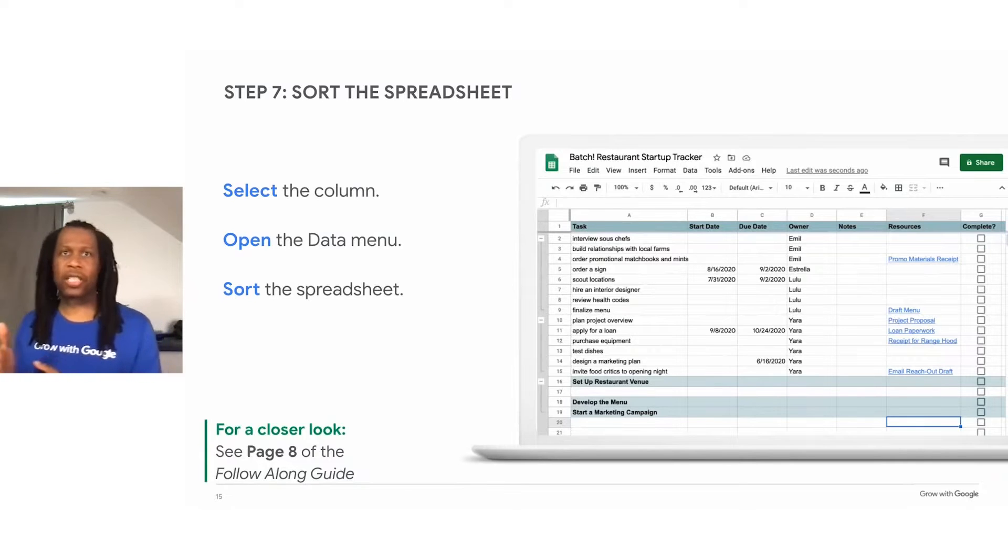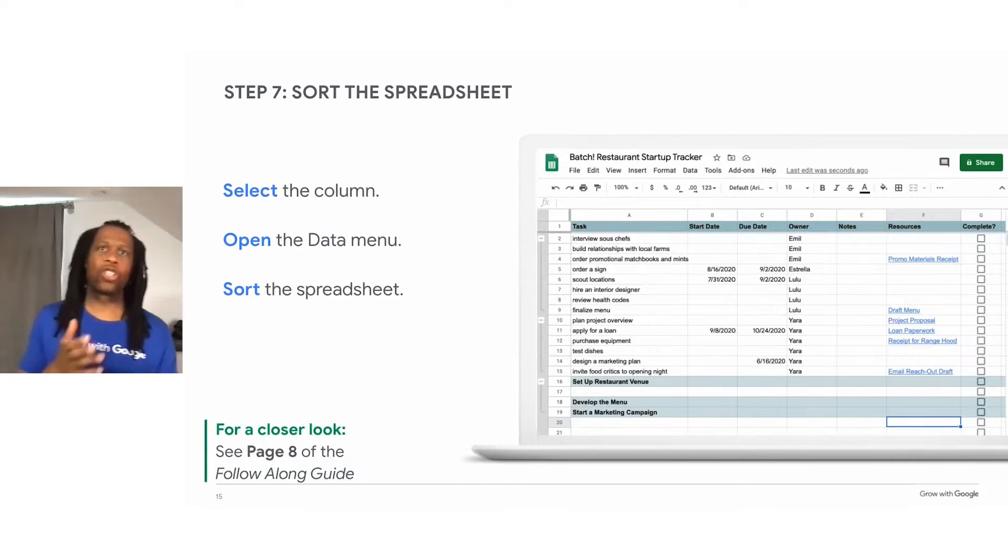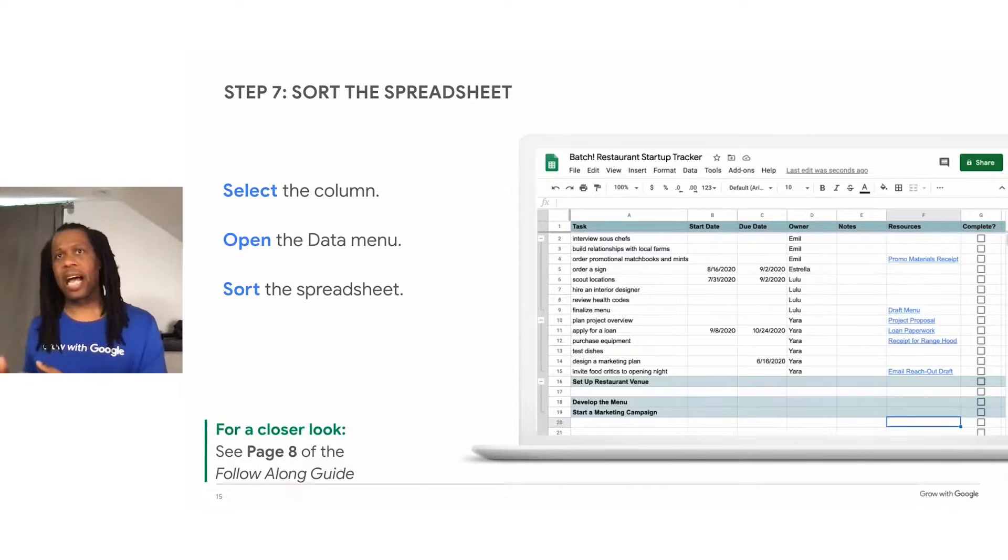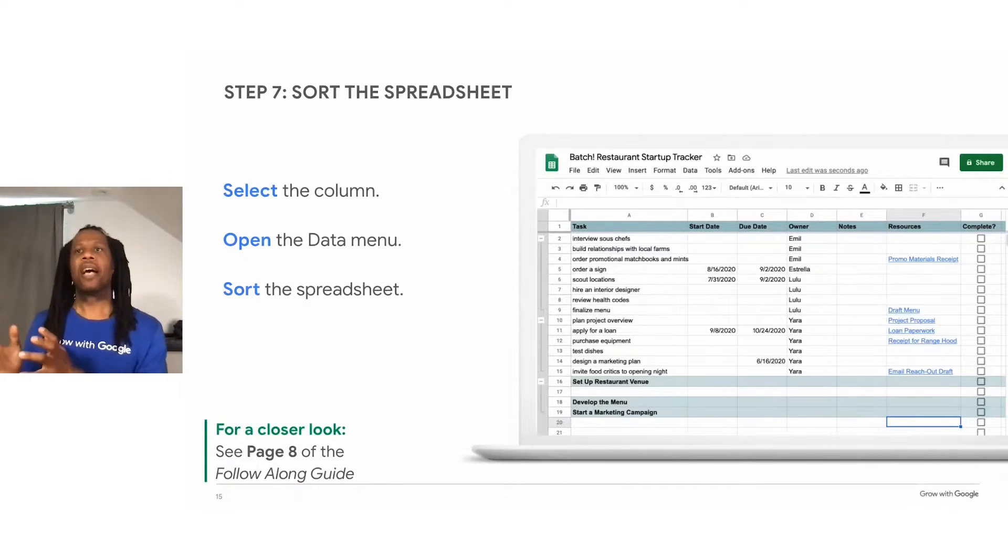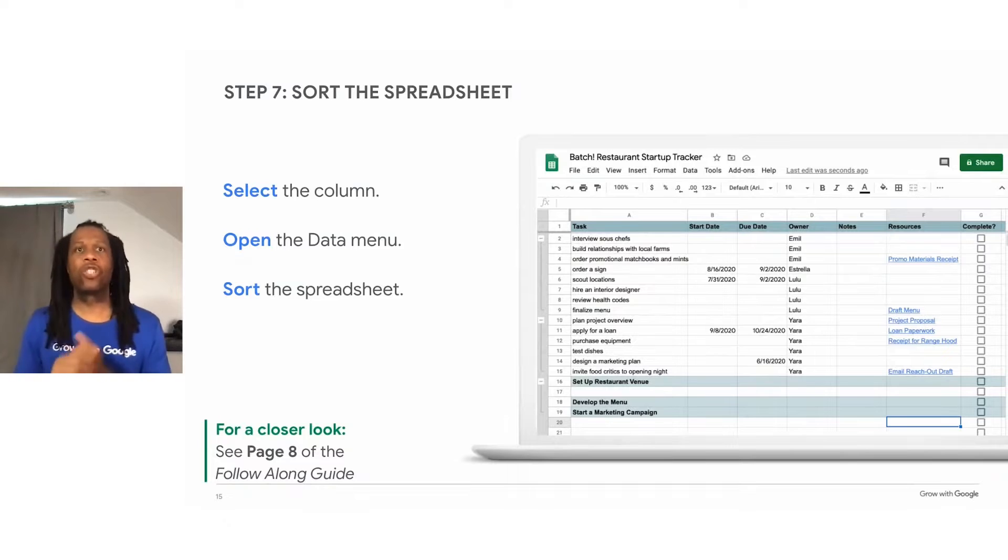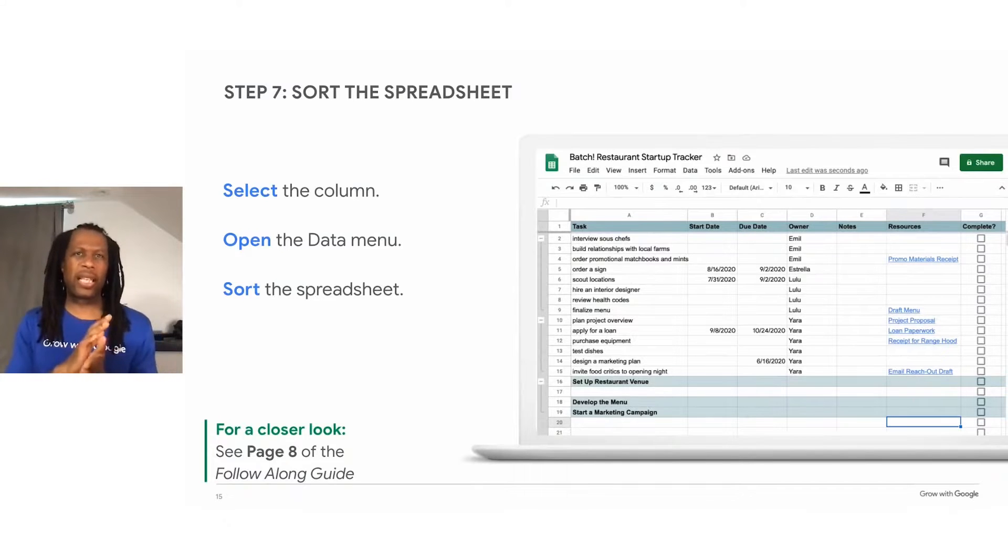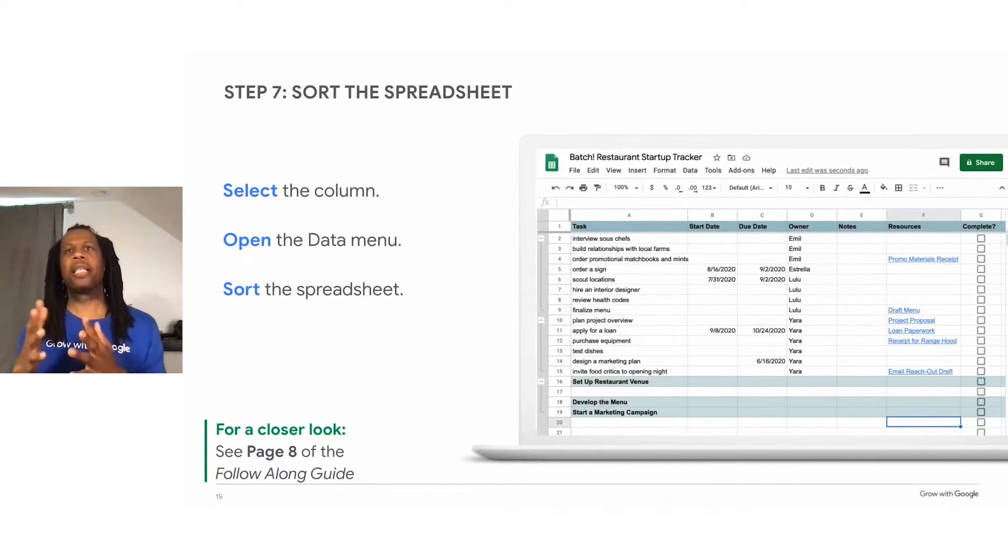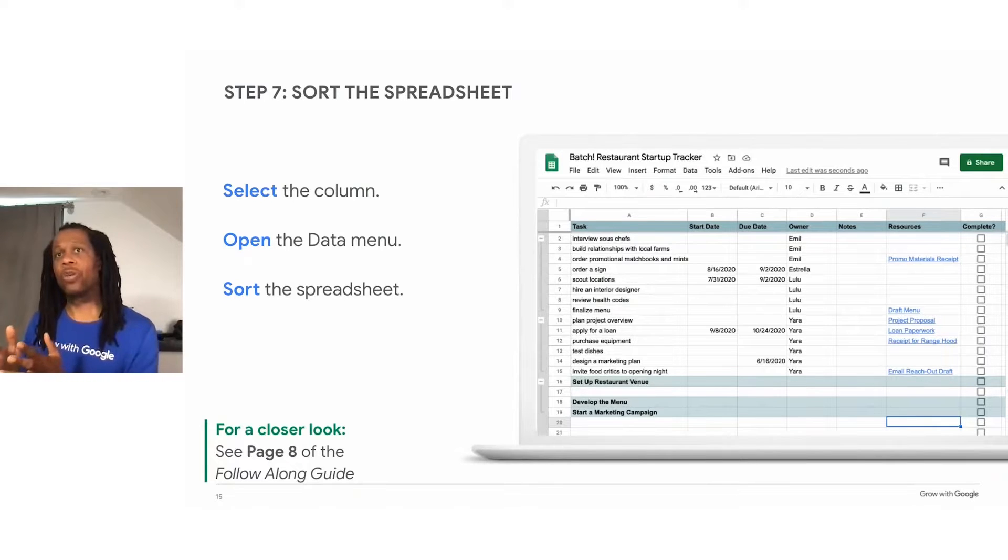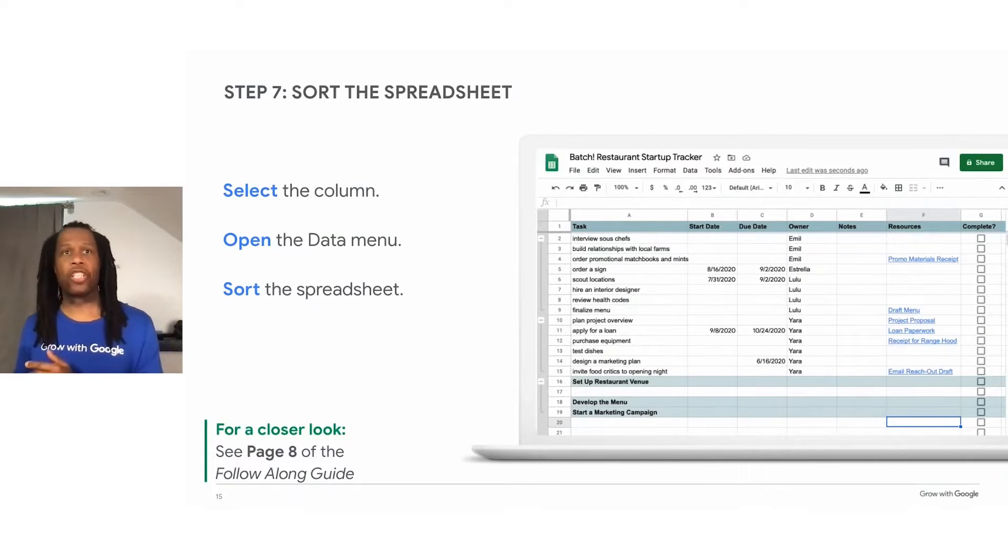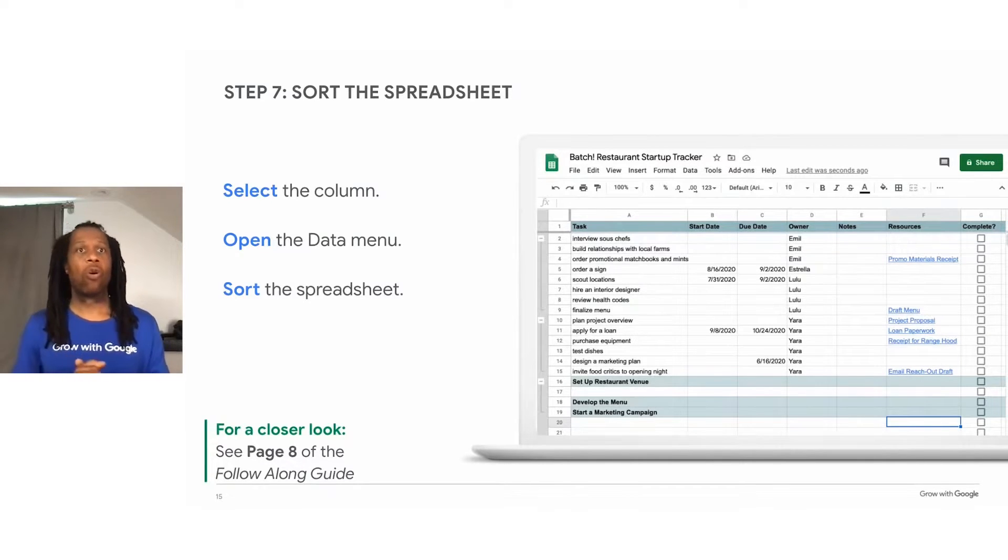The animation on this slide shows a user sorting the spreadsheet by owner. They select the column that contains the task owners, then they use the data menu to sort the spreadsheet. You can use sorting to quickly see all kinds of information. For example, if you wanted to see the tasks that are due soonest, you can sort the spreadsheet by due date.